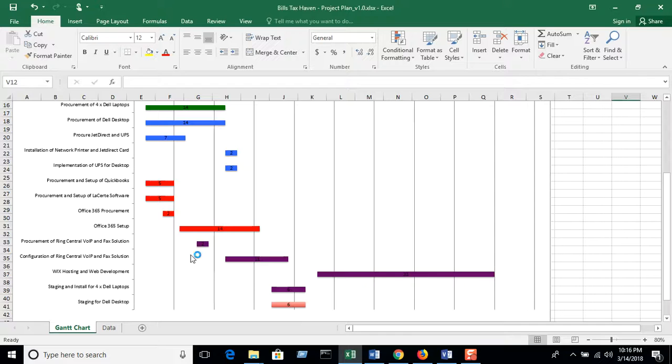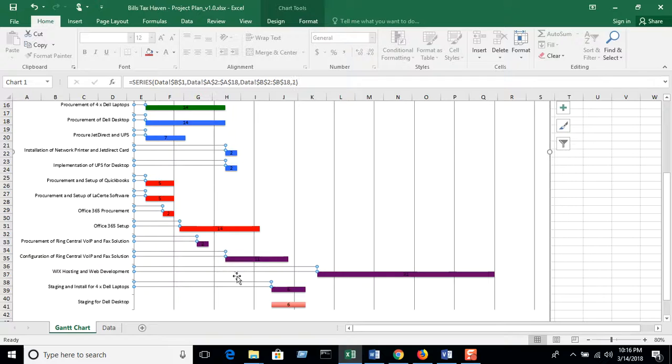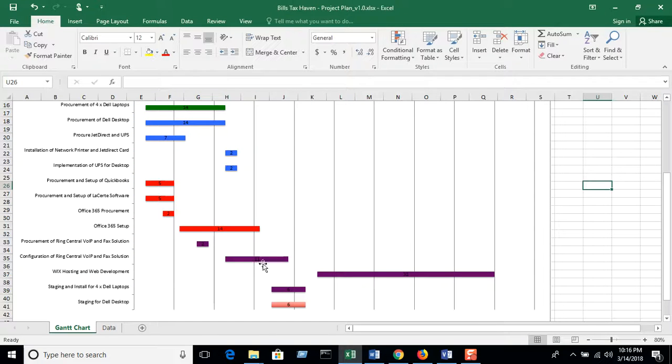You can see that we're procuring the VoIP software here, and then we're setting it up here, because you want to give enough time. The 2 days is in case you go into their web page and say order this VoIP service and provision these phones or whatever, but it might take a few days to happen. And then once you do have the access you need, you might have to spend some time configuring everything. So I'm allowing a little over 2 weeks for that.